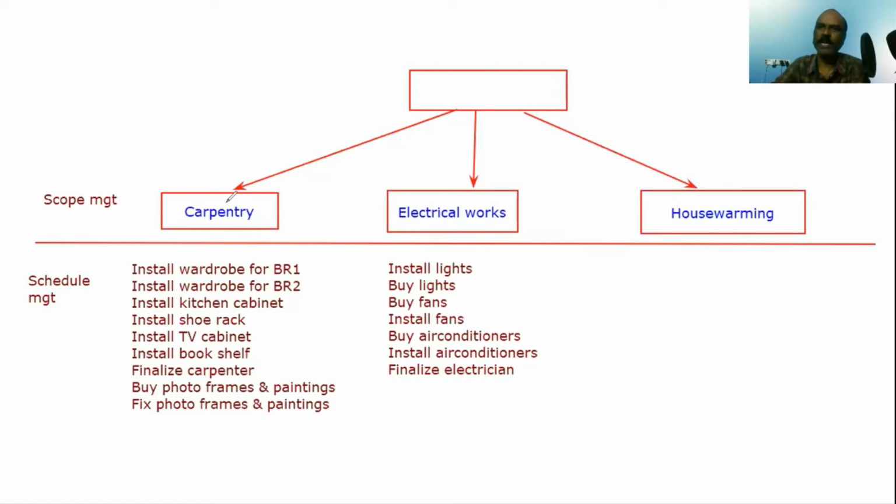Of course, there will be a target to finish the project itself, but that is sometimes difficult to monitor, right? For example, if you are doing a 5-year project and you say, I want to finish the project in 60 months, and that is the only target, then it's very difficult for us to know the exact progress of the project. We may not realize how much we are falling behind. So it's always important to have interim milestones.